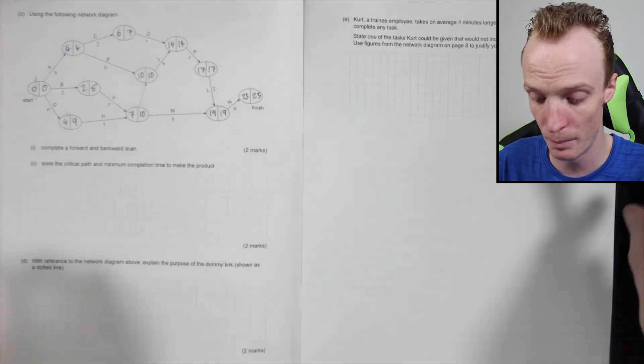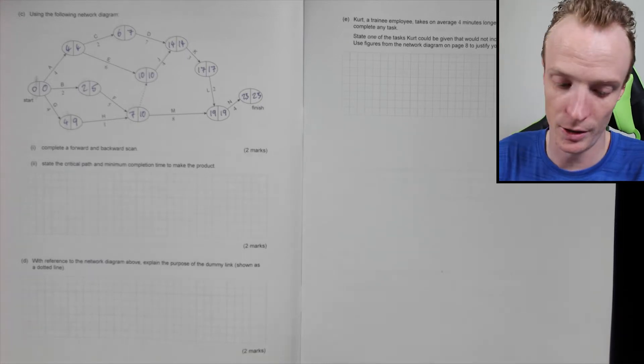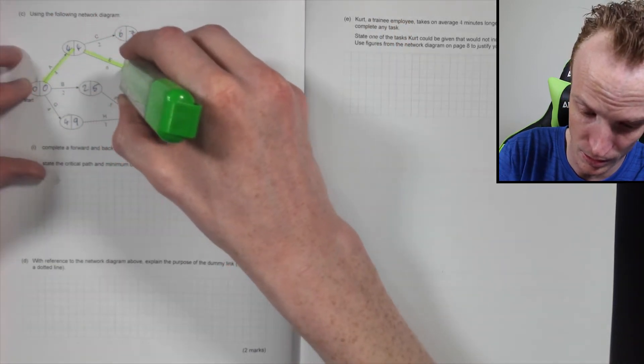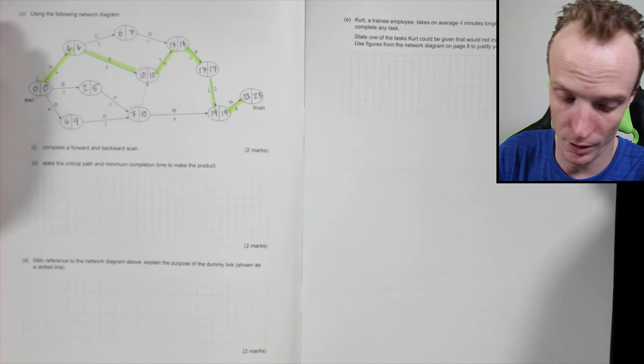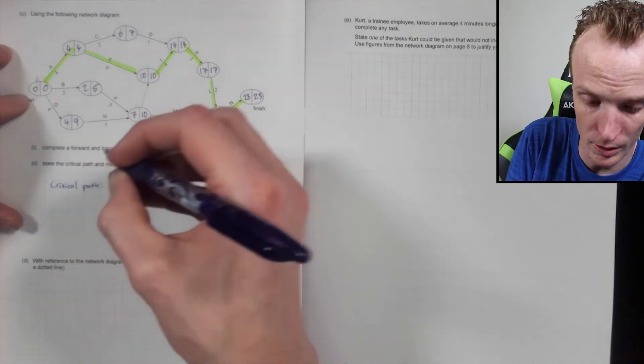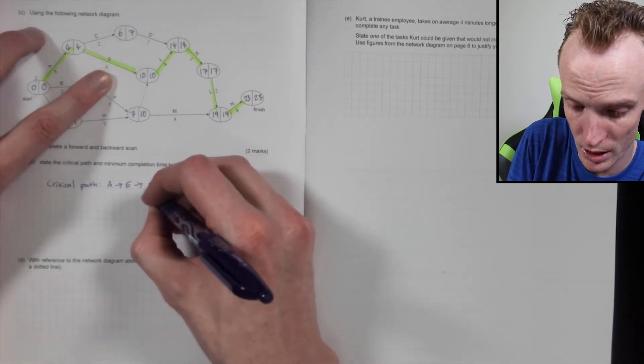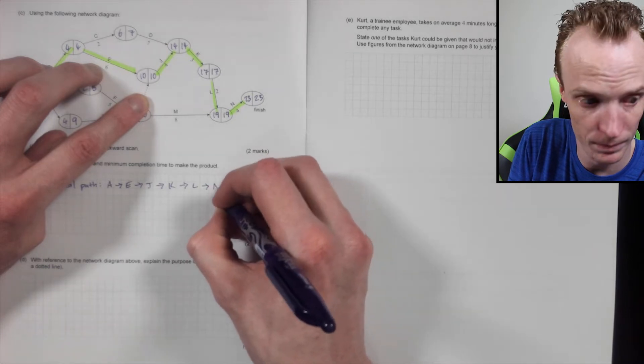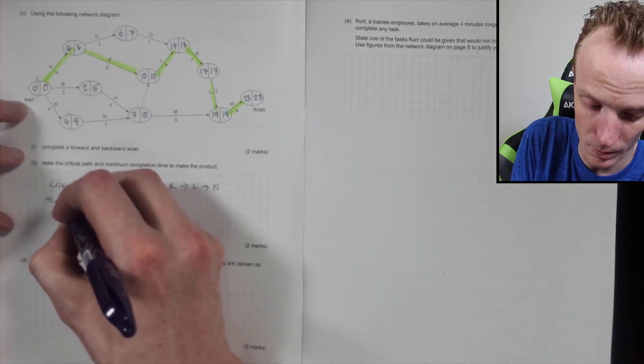Yeah, so that's the forward and backward scan. State the critical path and minimum completion time to make the product. Let's see if I've got a highlighter handy. I do. So when doing this, I like using a highlighter just to highlight the different path. So you can see here the critical path must follow there, there, there, there, there, there, and there. So the critical path is going to be task A to task E to task J to task K to task L to task N like that.